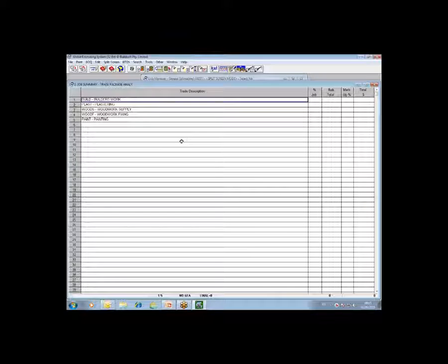So when rates are being built up, these OR codes can be applied to these rates to allow the increase or decrease of rates at the last minute when a tender has been submitted. If a rate for 20 and 30 concrete has changed compared to what was priced, you can reflect those changes fairly immediately throughout the whole job. Now, the resourcing codes can be used for that also. We'll be looking at that in more detail in the Tender Analysis 2 webinar, which is, as I say, on the 29th of June.